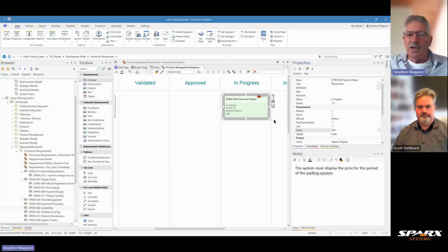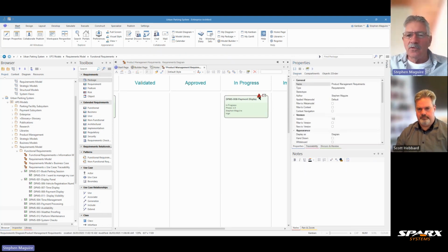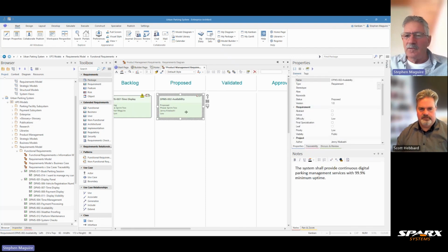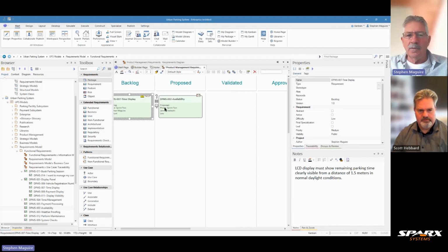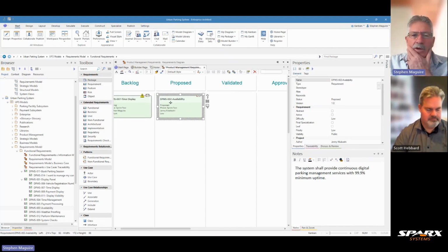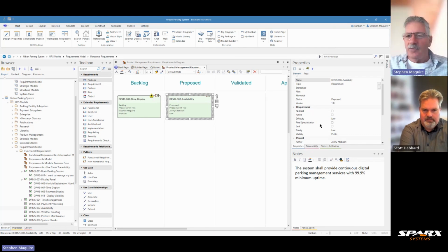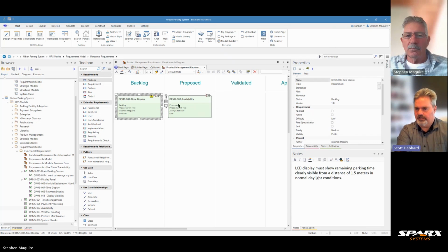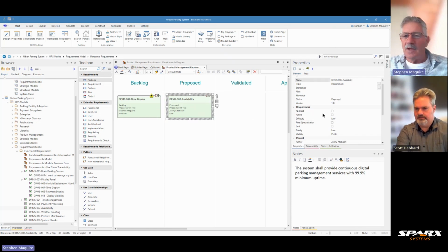So yeah, now you can see that what's actually happened is that little triangular icon in the top corner there has changed. This one is priority low, so it's not. This one was medium, so it's not getting an icon saying that there's any concerns about it. But the little yellow icon is telling you that there's something going on with priority there. So someone could look at a Kanban diagram and instantly identify what things are critical and need to be done straight away. Exactly, Scott.